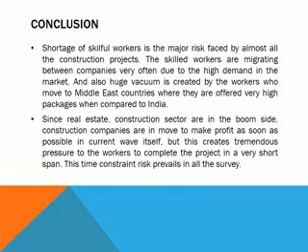Since real estate and construction sectors are on the boom side, construction companies are moved to make profit as soon as possible in the current wave itself. But this creates tremendous pressure on the workers to complete the project in a very short span. This time constraint risk prevails in all the surveys.